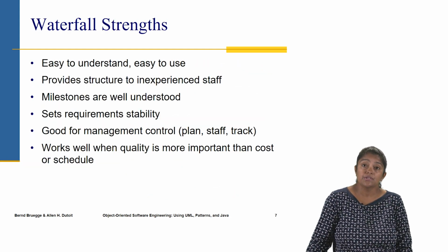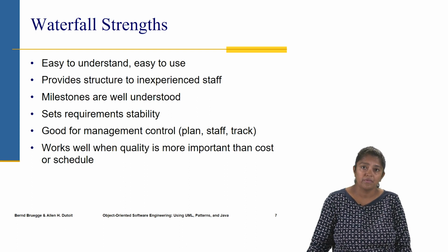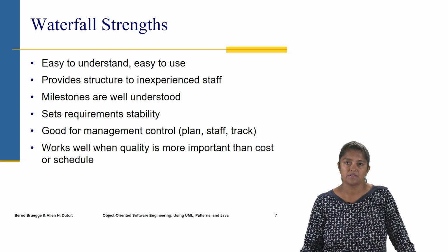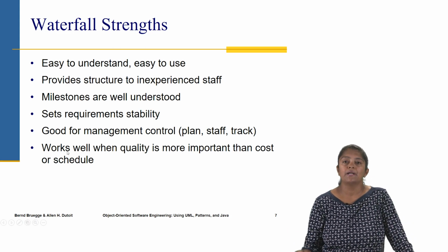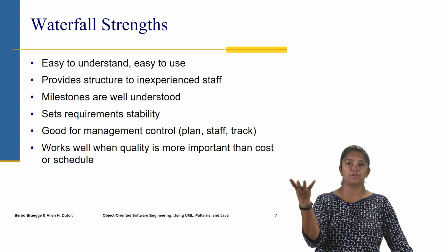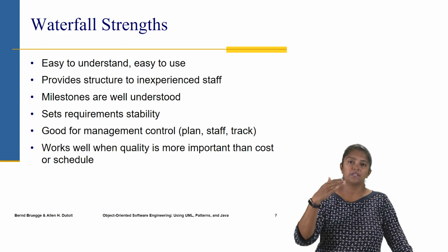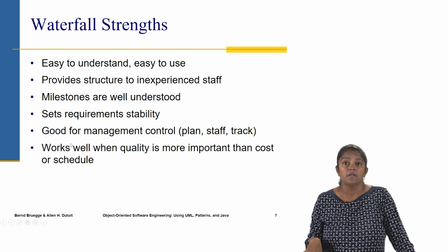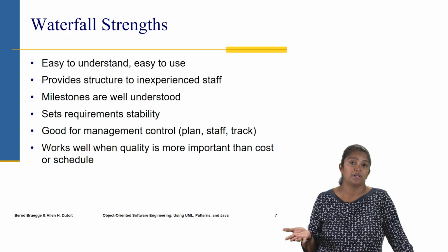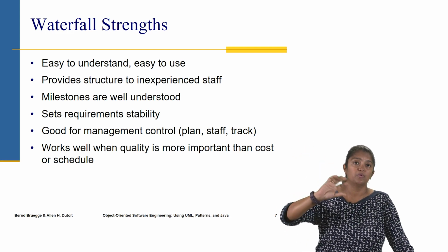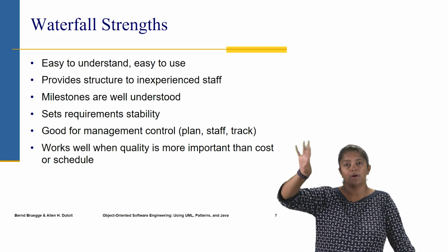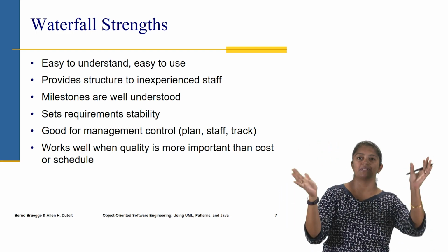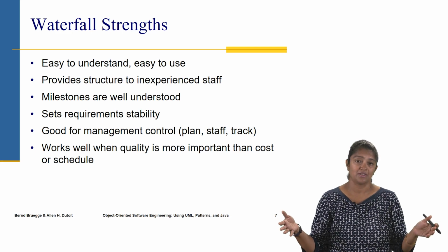Like I said, the strengths of this model are that it's easy to understand and very easy to use. The structure is such that any inexperienced staff can work with it. The milestones are well understood because completion of one phase, one activity, leads to the next activity. It sets requirement stability because you're done with requirements and you move on into design, which means that the requirements are set now. There's no looking back. So there's requirement stability and no scope for change in there.